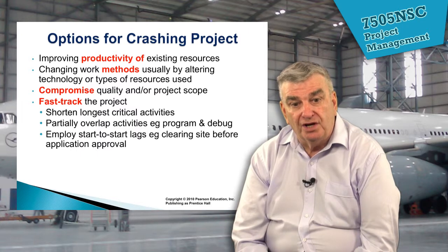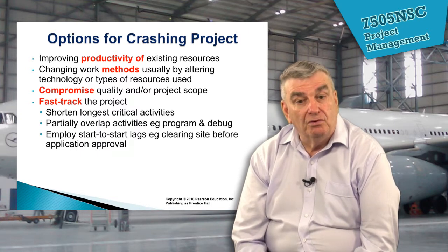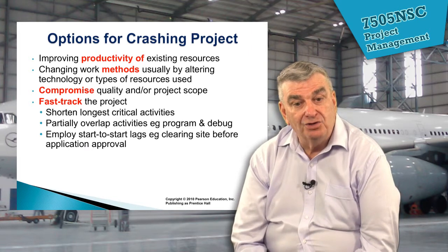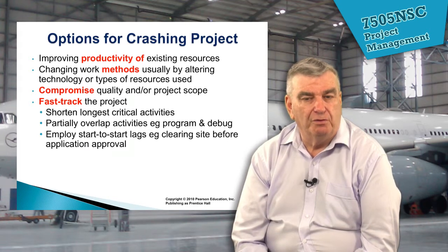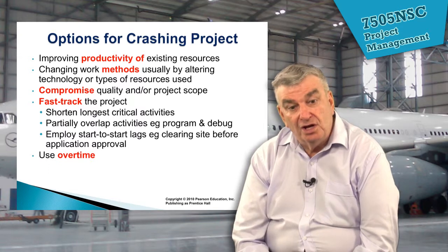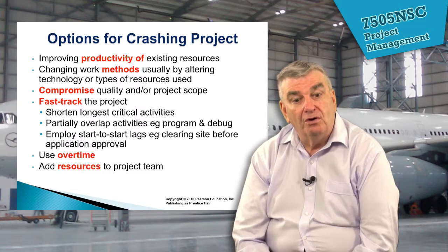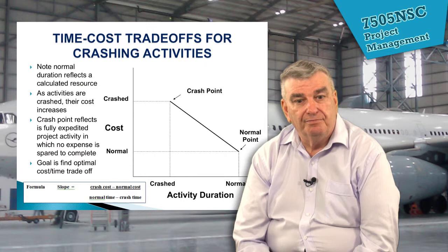And we can employ start-to-start lags, such as if it was building a house, we could actually start clearing the site before the council has approved the application, knowing full well that the council, in all cases before, has given approval. So there are different things. And of course, using overtime or adding resources to the project team.